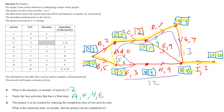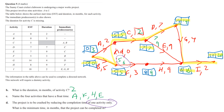You can crash F by 1, or C, D, or G by 1 before they become equal to F and H. To be clear: if you reduce the critical path of 13 by 1 — by reducing G, D, or C by 1 — it becomes 12, equal to the F and H path. So you can only crash one activity by 1. However, because of the dummy, there's a float of 3 between A and B: the B path is 5 plus 0 = 5, and A is 2, so you could crash B by 3.